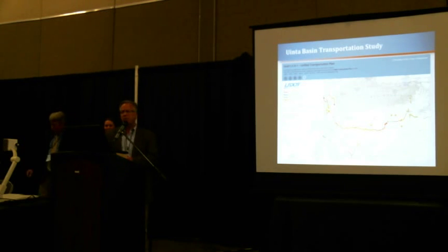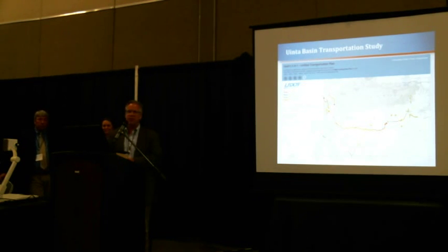We're also able now, with some of the fact sheets that were shown, to begin implementing a lot of the projects that we identified out of the study. The project that Charles highlighted, the intersection in Duchesne, was kind of a fun one. We knew we had a problem there, and it turned out we also had a micro going on in that same corridor, and we were able to get with the PM and with the RE, and rather than creating a whole new project, the contractor was simply able to make the changes. So an intersection where we saw a lot of accidents has now been fixed and restriped, and it's working better now. So we're starting to see a lot of the benefits that are coming from the study.